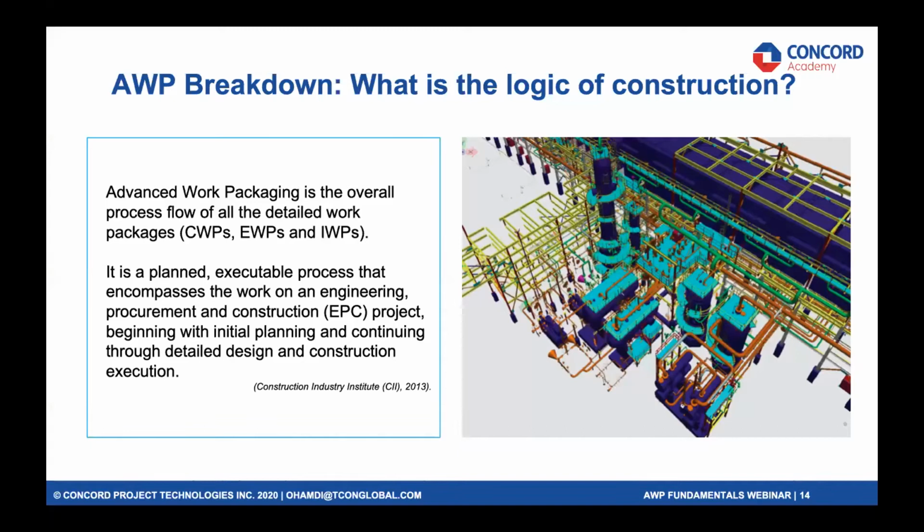So the advanced work packaging breakdown is really about the logic of construction. Your very first breakdown of your scope and of your logic of construction has to follow the way you intend to execute construction. And that intention, or that plan for how you're going to break down your construction, is the driver to defining your work breakdown structure.